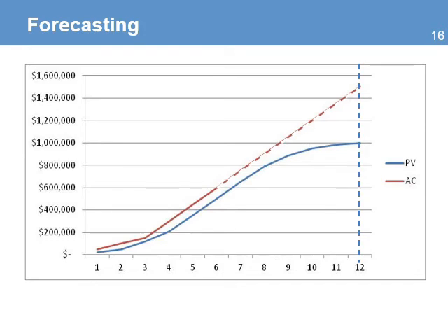If the CPI has a value of 0.67, you can see the value of actual cost to remain constant until the end of the project and will hit a value above the planned cost of the project. This analysis lets you see the variances between what was planned and the actual values. They can help you make decisions early in the project to take remedial actions and avoid unpleasant surprises at the end. There is no value in using this analysis when you're close to the end of the project, since it will be very difficult to fix it. You need to use it early in the project on a regular basis. The analysis can help you make changes in the project when you have the time and before those problems become unmanageable.